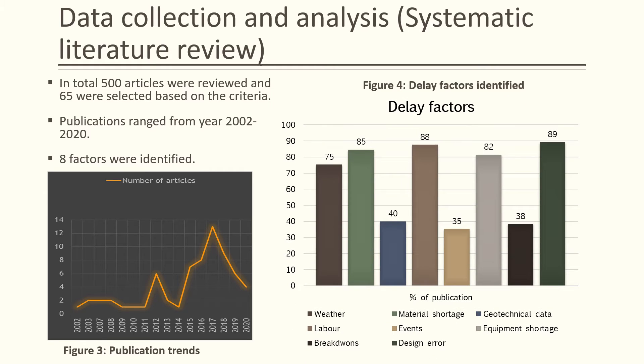89% of articles confirmed design error, 88% confirmed labour shortage, 85% confirmed material shortage, 82% confirmed equipment shortage, and 75% of articles confirmed weather as a factor. Other factors confirmed by smaller numbers of articles included events, breakdowns, and geotechnical errors, which were also identified during the systematic literature review.